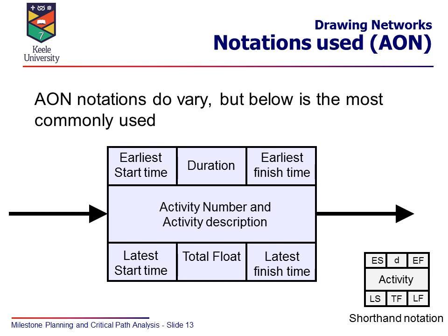Now I say different house styles vary, different companies vary, different textbooks vary in what they represent, but this is the one that we will be using. Really each activity represented by a box. You can put a description of the activity in there if you wish, the duration time, the time to take for each activity, and then indicating earliest start time, earliest finish time, and the latest start time and finish time for that activity. And there's also room to put in the total float, or if you like the slack for